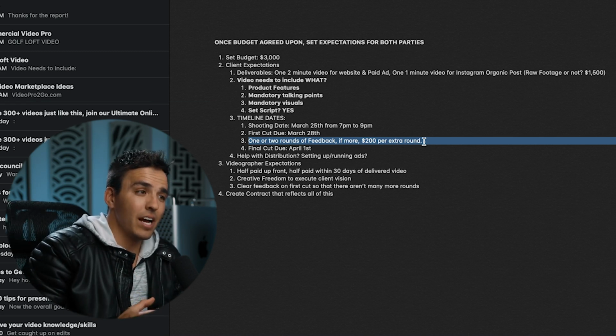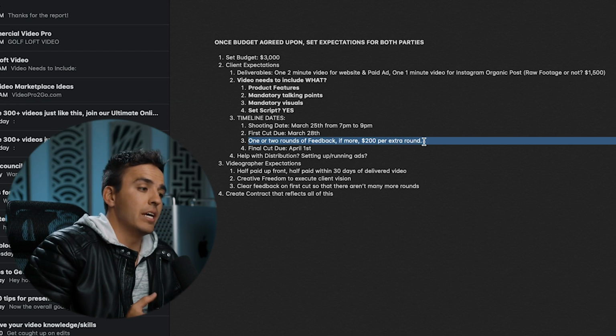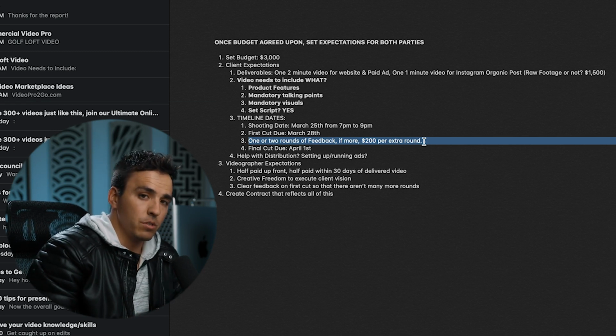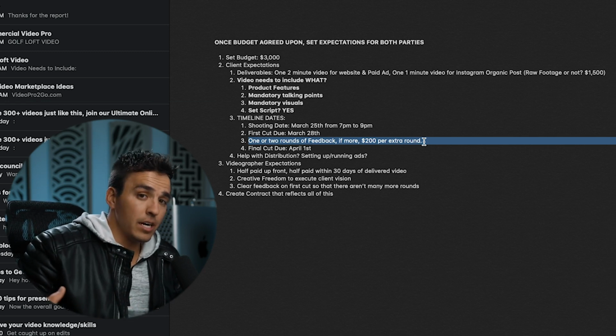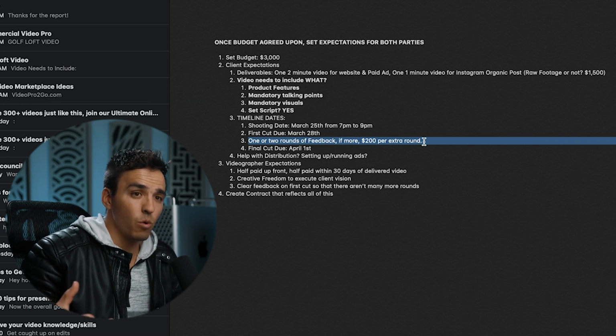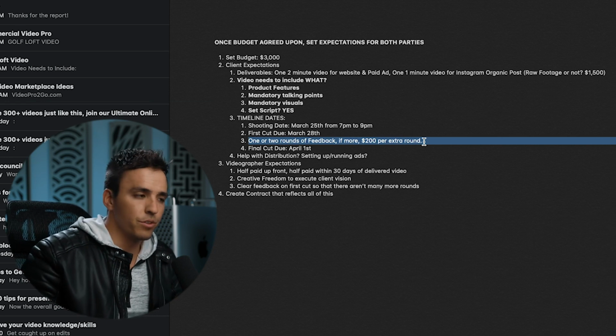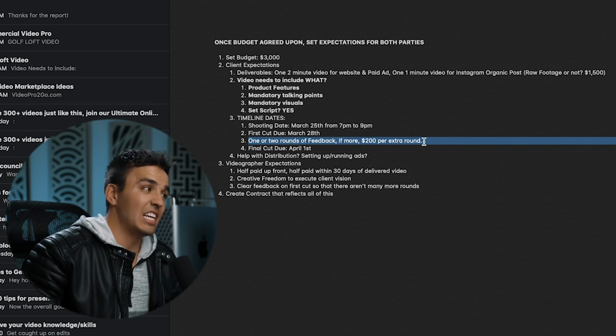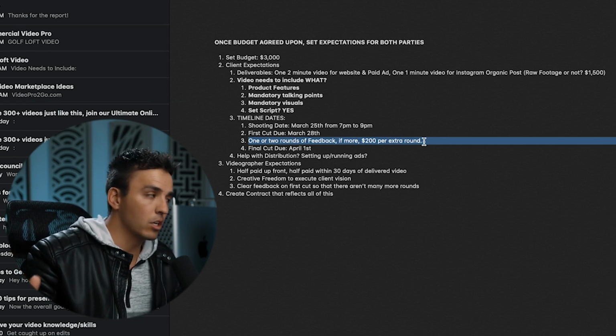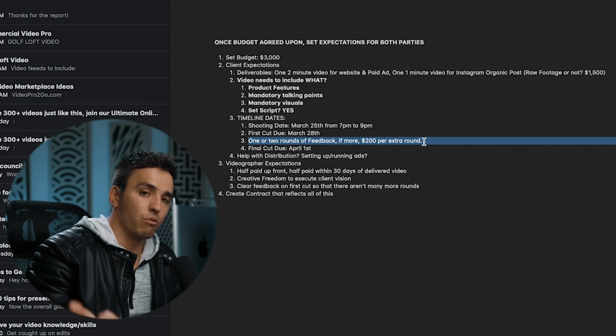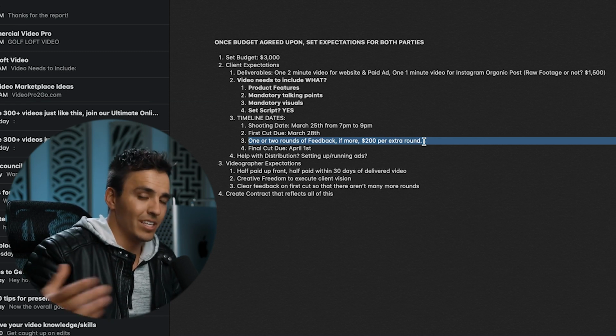And I've actually had big clients where the project original budget and expectation was set for around $30,000. As we neared the end of the project, they started asking for all these other things they wanted. They wanted new edits. They wanted different things that they didn't mention before, so they'd have to go reshoot things. Sometimes I've ended up charging an additional 10 grand on a single project because people needed more stuff reshot or re-edited that wasn't initially discussed.